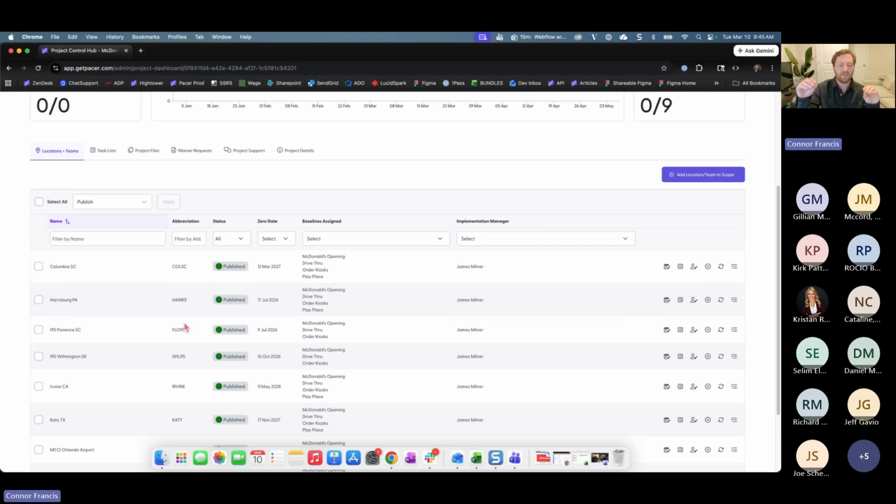Now that you've added those, you've broken 1 into 4, and you have those 4 in there, you can start to hand select. So basically you can sunset a baseline without having to completely redo it in the middle of the process. You'll just say, okay, from every location from January 1, 2027 and forward, we're going to choose 1, 2, 3, or 4 of the 4 baselines I have rather than just the one. So it's like a cutoff point. I think that answers your question. If you need more detail or want to work on this together, I'm definitely here to help.